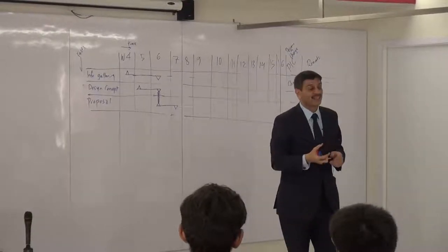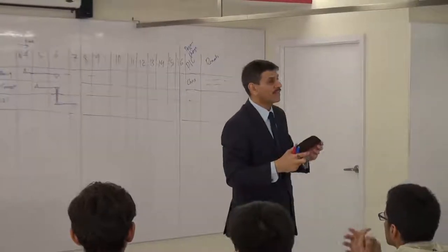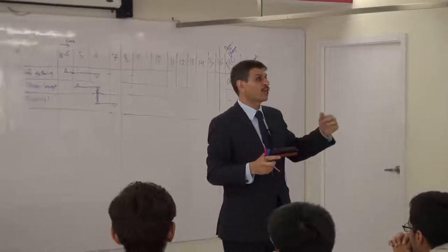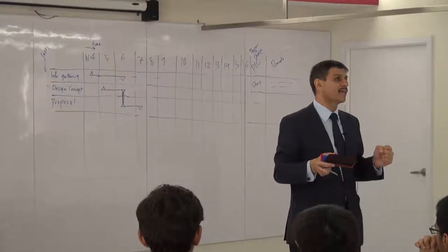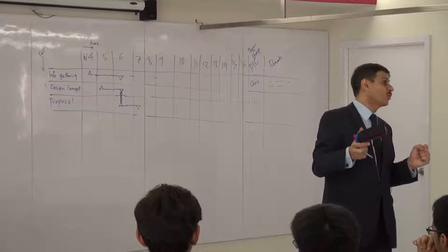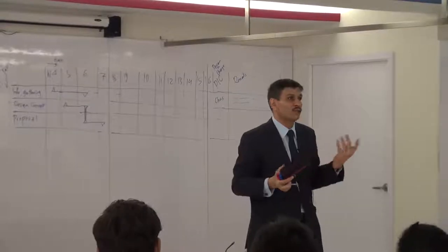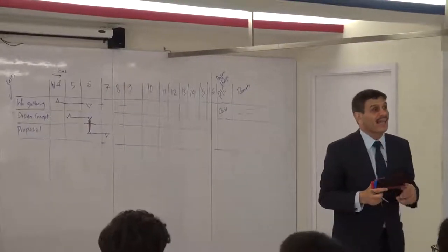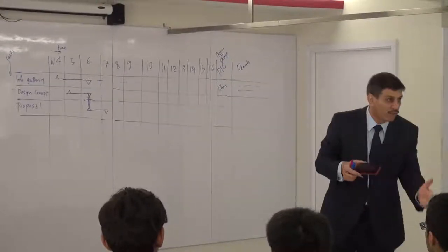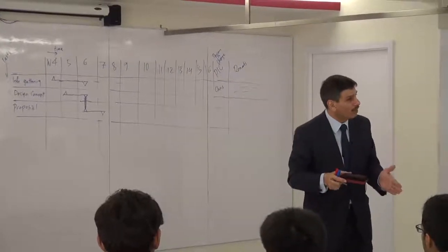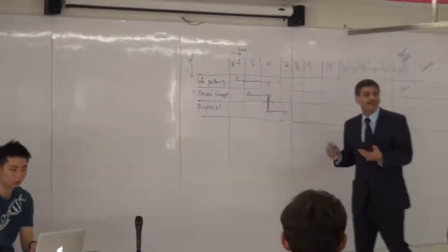Certain tasks don't have a prerequisite. For example, if I'm building a campus or a house, I could be purchasing or ordering the ICT parts even before the building is complete. That's totally acceptable. But until I finish the foundation, there's no way I can build the wall. So the foundation first. If the foundation is delayed, building the wall is automatically delayed. So this is an important thing for us to understand.